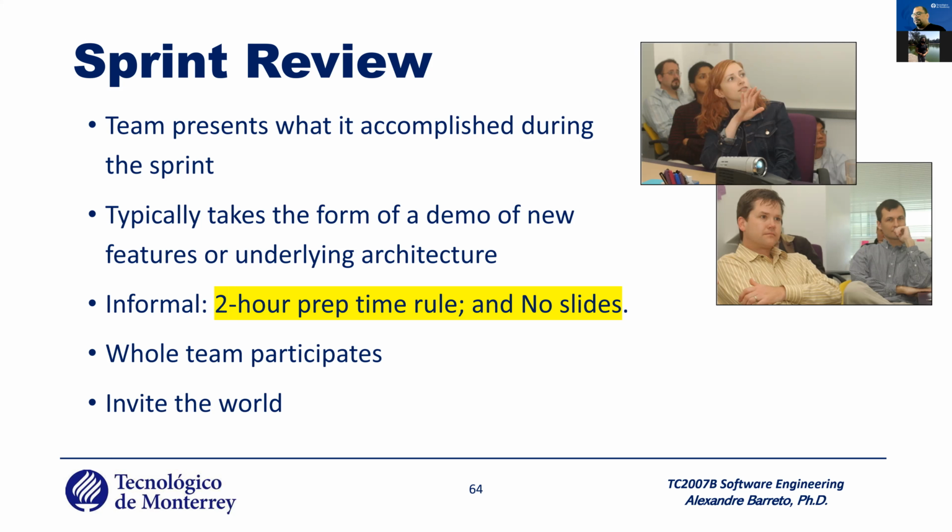One thing that I didn't say about the daily meeting: the daily meeting happens every day at the same time. Every day, never changed, okay? When you start the project, you define a time, the same time, when the daily meeting will happen. This time you don't change anywhere. You follow this time all the time. People adjust their schedule to be in the daily meeting.